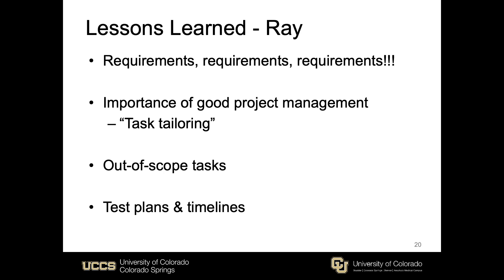The number one takeaway from BoozeStack was the importance of requirements — ensuring the customer, end user, designers, and engineers all have the same vision for the project. At the end of our requirements review last semester I was confident the customer and our team had very specific and thorough requirements. It wasn't until we had already built the initial version that we started to see that not only the customer and team had different interpretations, but members of our own team had wildly different views of what our requirements were. We were fortunate to work through most of these issues, but I really don't think you can spend enough time hammering out detailed, super-specific requirements.